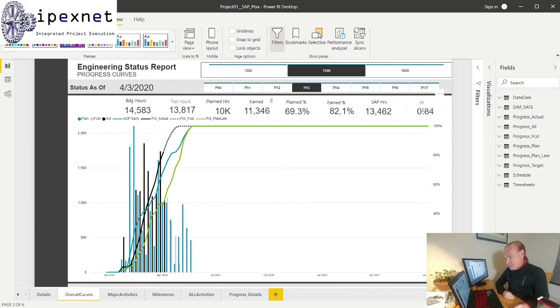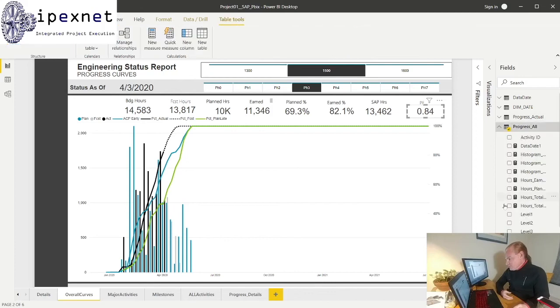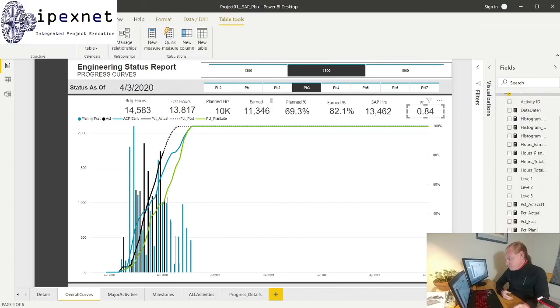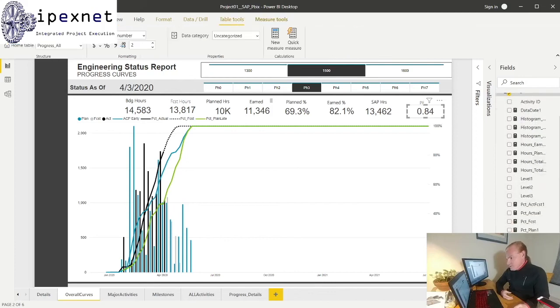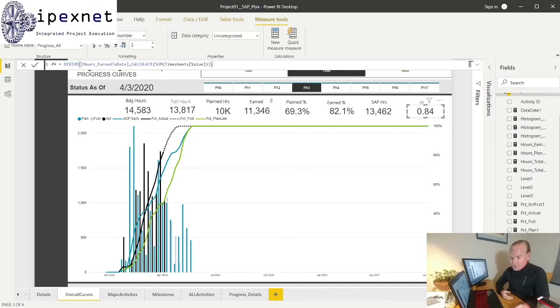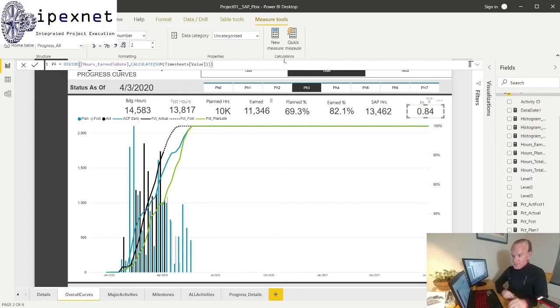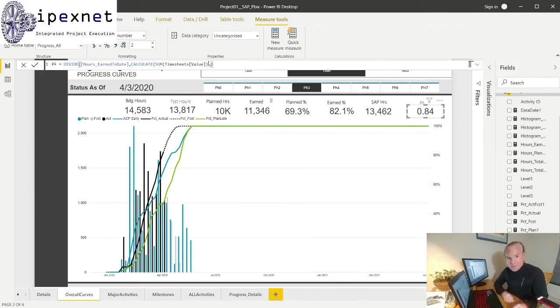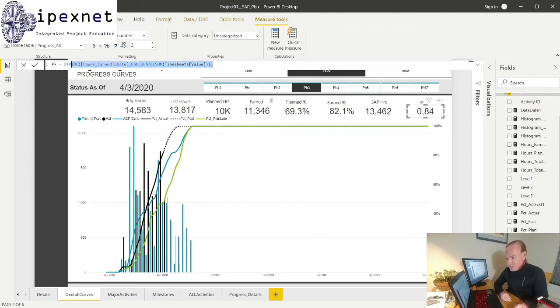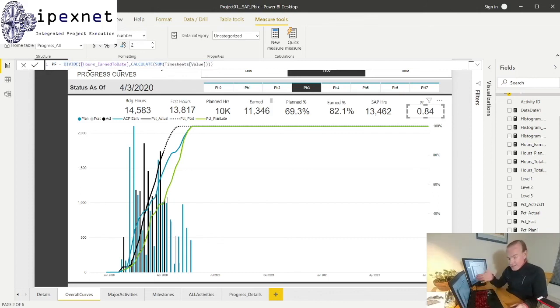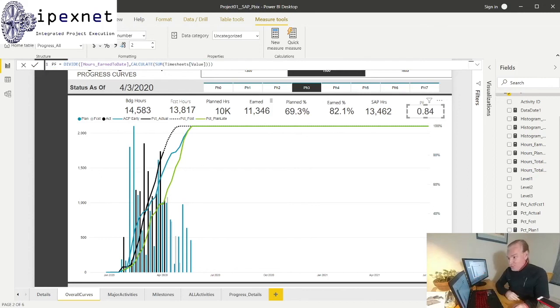This is just a measure, it's just a measure in my progress. Let me open it up. What are we doing? I'm just summing another measure which is hours earned to date, and then I'm just dividing that by the sum of my timesheets. I'm just assuming that my timesheets are up to the same data date - I'd have to put a filter on them if there's a different data date. But anyway, I didn't really want to get too much into the measure calculations, but that is one of the intricacies of Power BI. You really can't make effective Power BI without understanding how are you going to generate calculated measures to have nice visualizations.